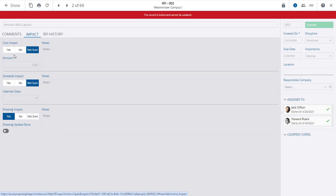Each area offers a Yes, No, Not Sure option with additional fields to enter Cost, Days, and to indicate that the drawing has been updated.